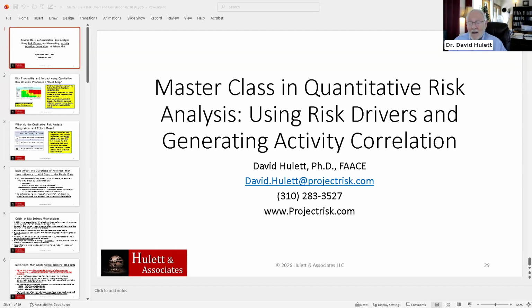And one of the things that one of my other associates, Keith Hornbacher, and I have done is produce a recommended practice on using risk analysis at the earlier stages of the development of the life cycle of a project, where you're just still looking at analysis of alternatives. And your analysis of alternatives might very well be determined by the risk associated with one of those or another one of those. You don't even have a schedule yet. In fact, you don't have a project yet.